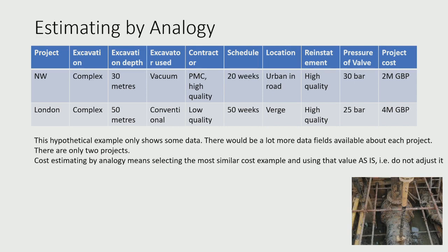But because there were only two examples and we needed to estimate the cost of 200, and we're at the early planning stages of a project to repair 200 high pressure valves at umpteen meters beneath the ground around the UK, there's no way we could do a detailed, accurate estimate for that. We just wouldn't have the time and effort and information to do that. So you'd simply do an analogy,